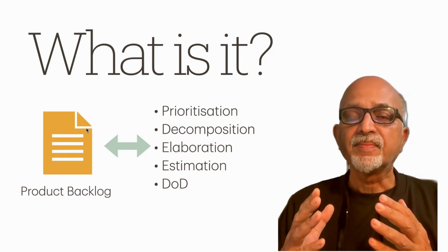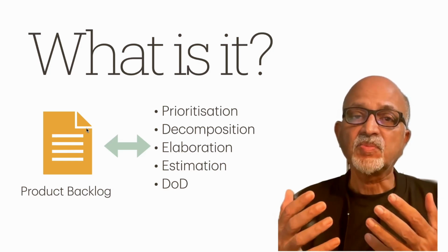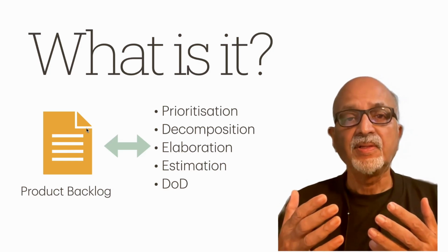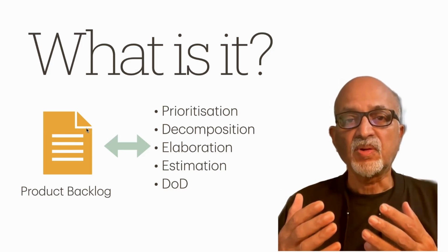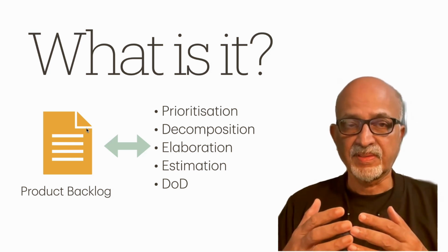And sometimes we get epics, that means very large requirements which cannot be estimated in one shot. So they need to be decomposed further into smaller user stories. So decomposition will do it for us.